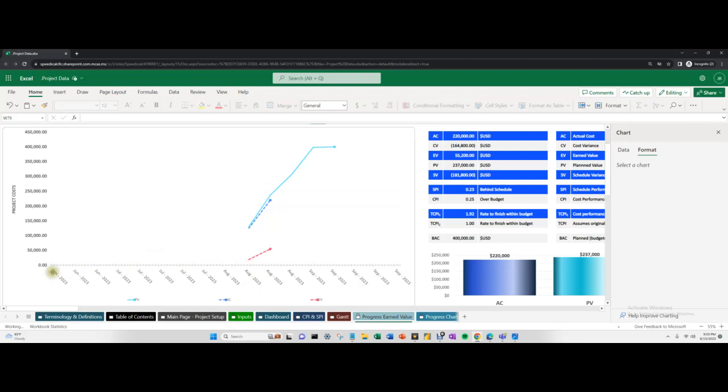If the first week you had like 1, then it would be down here. And if you want to see where it's 0, then I recommend that you put like 0.01, where it basically hits the 0 mark, but it's an actual value that you're following. So just looking at this, I know immediately in my first week that this is how much I paid, or this is the value of my earned value.